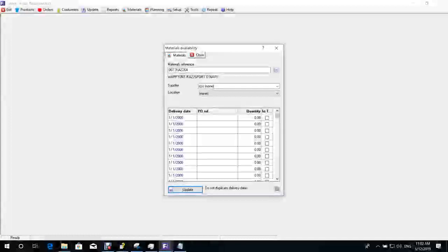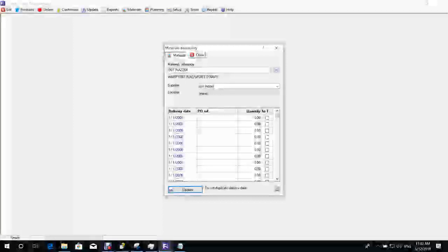How long in advance do you need to order your accessories before receiving your PO? Accessory, we must always order it when we receive the official PO. When you receive the official PO, how long until you start? Maximum 30 days. For the imported ones, sometimes it takes 45 days for special customers, not all. But it's normally 30 days.